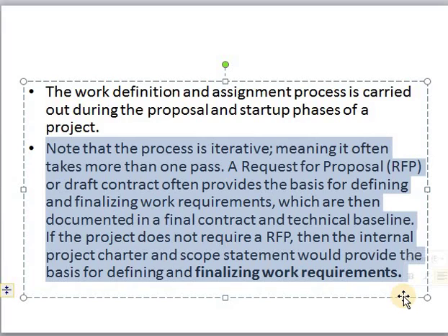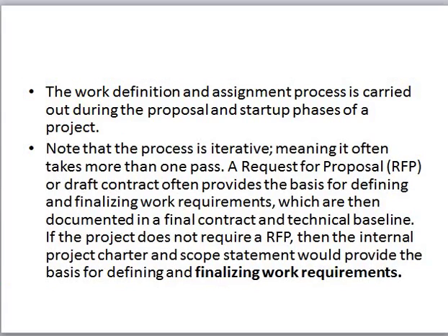If the project does not require an RFP, a request for proposal, then the internal project charter and the scope statement would provide the basis for defining and finalizing the work requirements. So, according to the nature of the project, if you don't need an RFP, then you can use the internal project charter and the project scope statement to provide the basis for defining and finalizing the type of the work you need to accomplish.